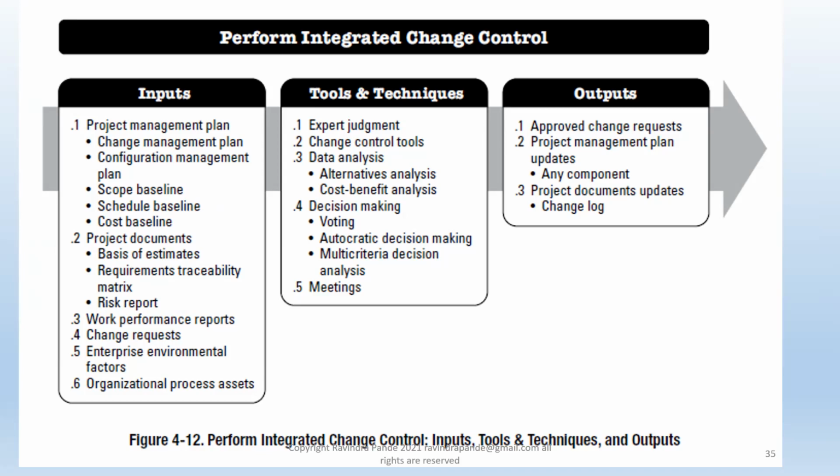Then the cost baseline, same. How are we spending in terms of our project execution? Do we have too many resources? Normally the cost baseline is not a flat figure. If you have ever looked at the graph of how the cost spendings happen in a given project, it's a kind of inverted parabola, in the sense that you normally start at a certain cost. Let's say given an $8 million project, as we were discussing earlier, we normally start at spending of 1 or 1.5 million to acquire the assets for the project.